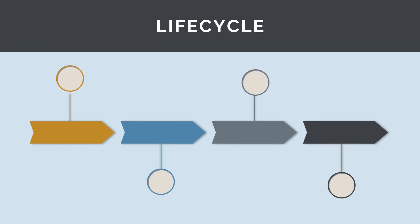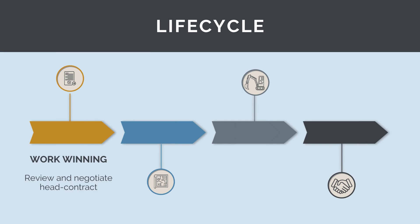As with all the other construction management skills, procurement and contract management is used across the life cycle of a construction project. In the work winning phase, we will review and negotiate the head contract with our client. We will also begin some procurement activities as part of developing the delivery methodology and estimate for the schedule.